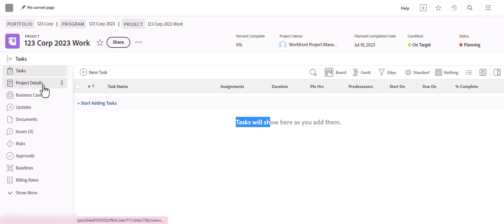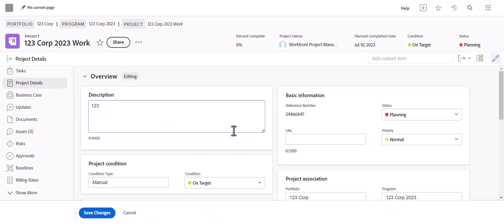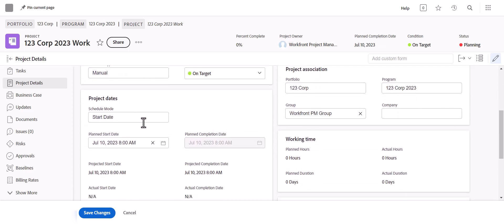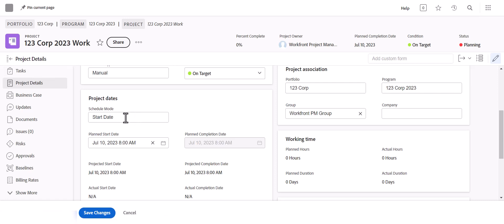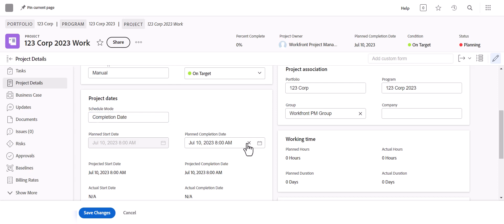If you take a look at the project details when you start a project from scratch, you can add a description here. The project dates and the schedule mode refers to the tasks you're going to be entering. If you have tasks where you're unsure what date they'll go till, it's usually best to schedule from the start date so you won't be limited with what your planned due dates can be. If you know the project needs to be completed by a specific date with no leeway, you can set the schedule mode from the completion date.